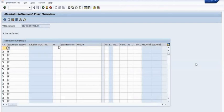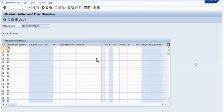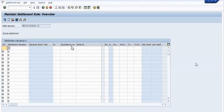For example, in one site we have installed the RNC, BSC, and BTS, and we have created one project and one WBS — not individual WBS. Then we need to create three assets: one for the BTS, one for the RNC, one for the BSC. We have to transfer the percentage of the cost — for example, 30%, 40%, 30%.